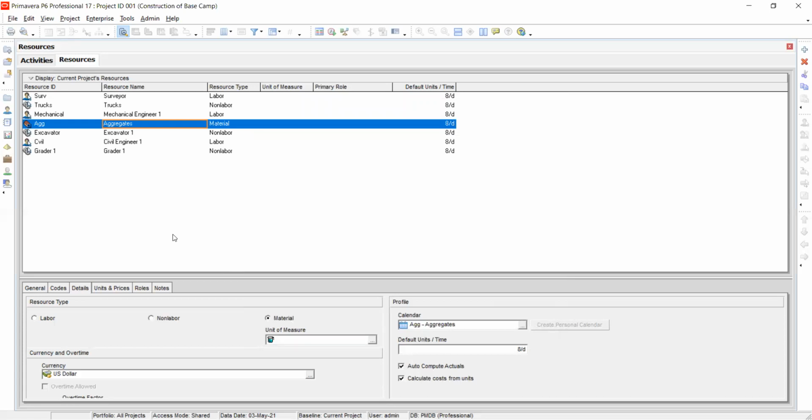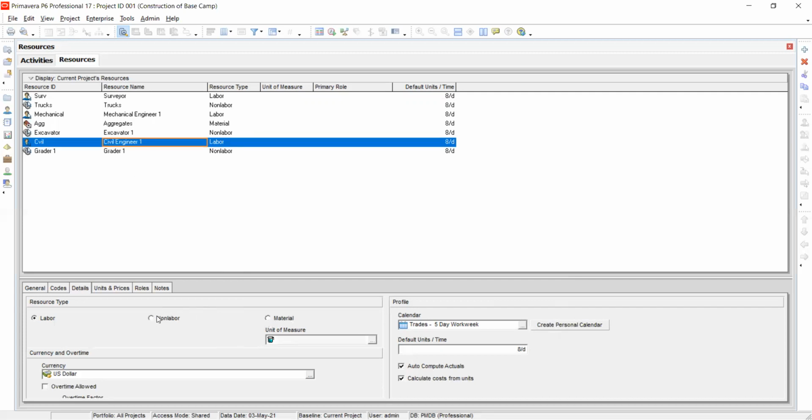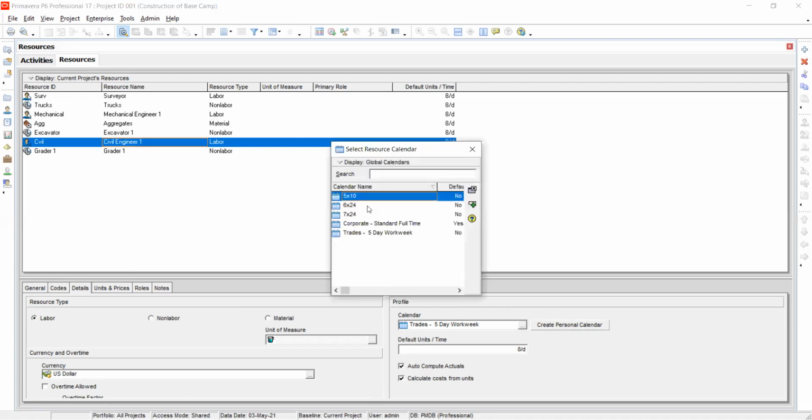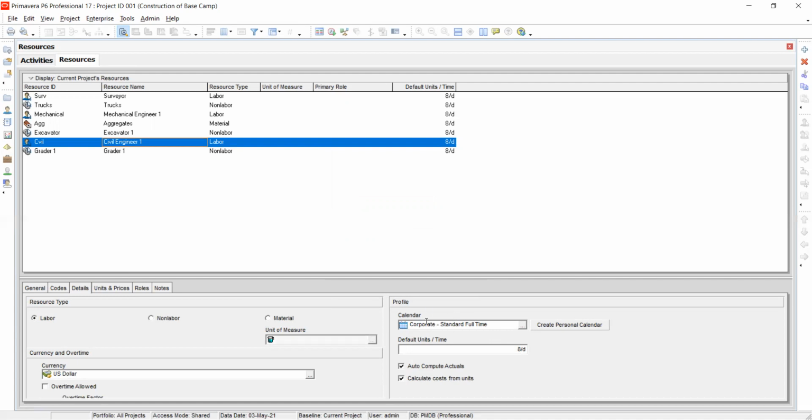In case you have a particular equipment, you select whether it is non-labor or labor. Equipment can be labor because it can replace people. Instead of using a lot of people, you're just using an equipment that is doing a particular work for you, so it can be categorized under labor. Then you come, create, and modify accordingly. If you want it to use this one, select it and click select, and it will be the one selected here.